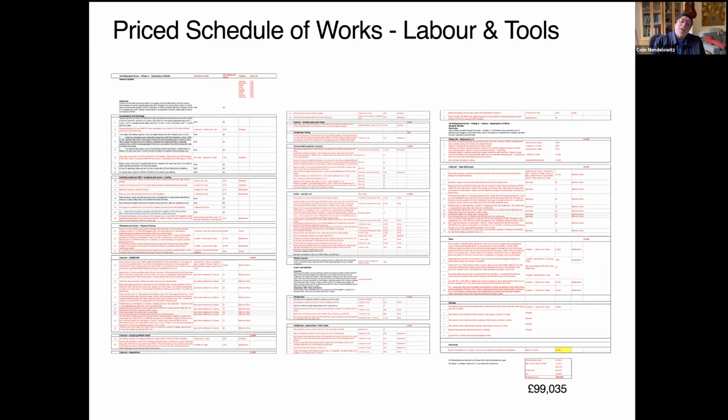So at this point, construction management kicks in, because by buying his own risk, the client is able to not pay extra, because he's paying for labor and tools from a contractor, and he's paying for materials, which I buy on his behalf as a construction manager.